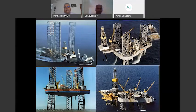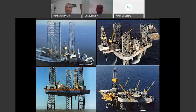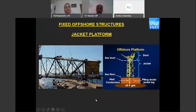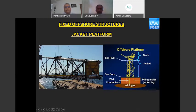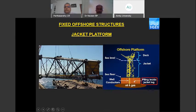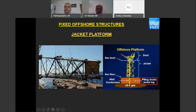Once wells are drilled and a good reservoir of suitable quality is found, the production stage begins. Fixed platforms are installed by fabricating a jacket structure whose length equals the water depth. It can be four-legged, tripod, or eight-legged depending on the design. The jacket is placed on the seabed, and piles are driven through the jacket cans below the seabed until the design penetration is reached. Once piling is complete, the jacket is welded to the piles, the top deck is fabricated in the yard and placed on top, and the platform is ready for production.